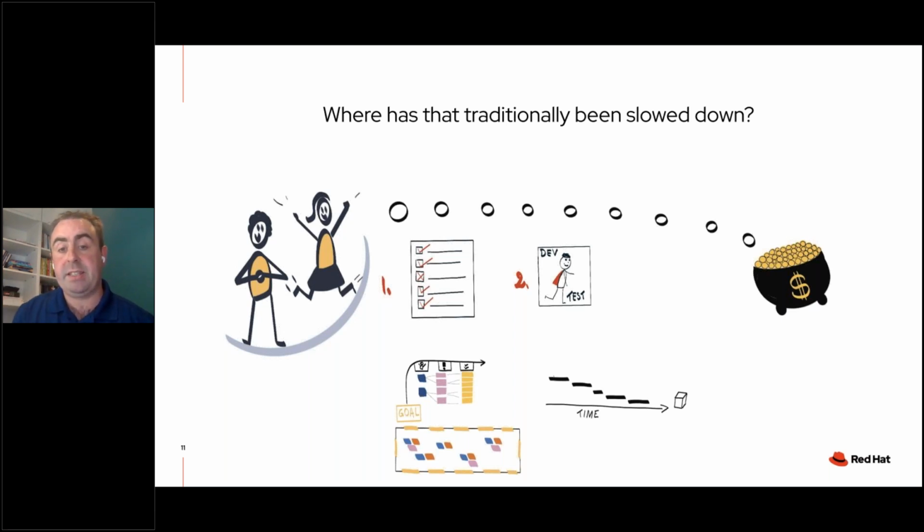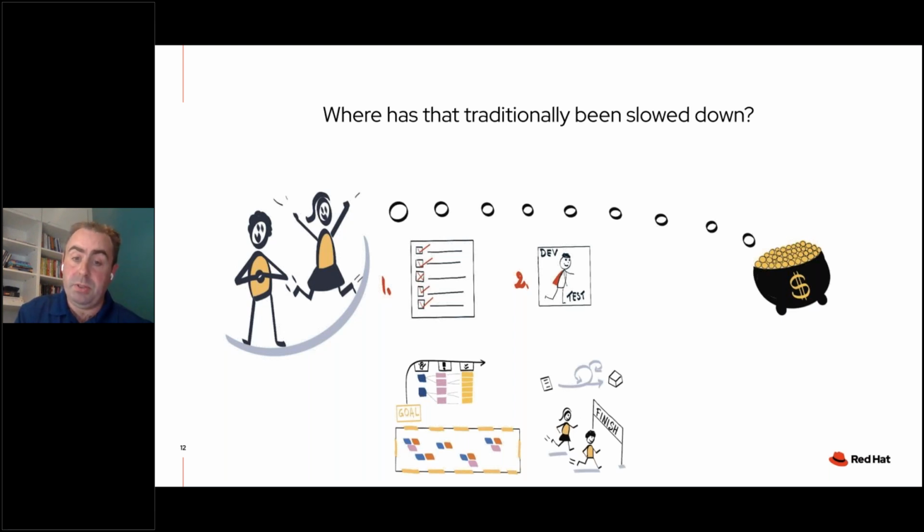So this stepped process was quite a long gap between getting those lists of requirements that come from our business analysts and business users into a software artifact. But more recently, we've been using agile approaches. So agile frameworks such as Scrum and Kanban, working in sprints where we take a smaller number from that list in step one and deliver smaller increments of value, so that we are delivering more iteratively and incrementally rather than in that big bang go live for all of the requirements. So Agile has really helped us plug that gap between lists of requirements and development and testing of those requirements.